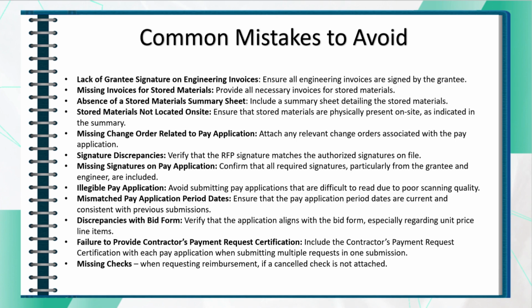Another comment, it is okay to submit multiple contractor pay applications with one RFP for grant funds. Lastly, remember to provide the SKIP contractor's payment certification request with each pay application when submitting multiple requests in one submission. This certification is required for all SKIP projects to ensure federal compliance. By avoiding these common mistakes, grantees can help ensure a smoother and more efficient RFP submission process, ultimately leading to timely funding.